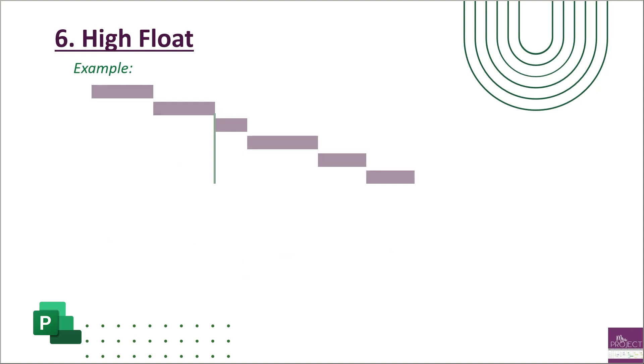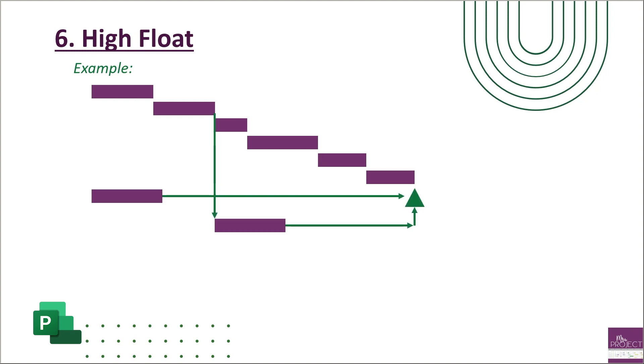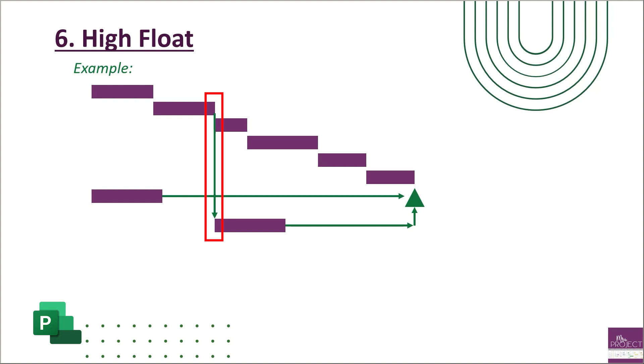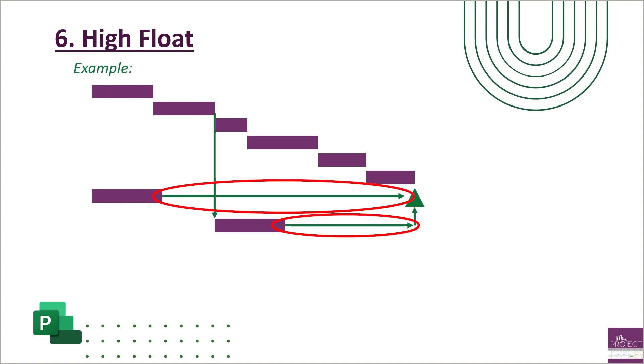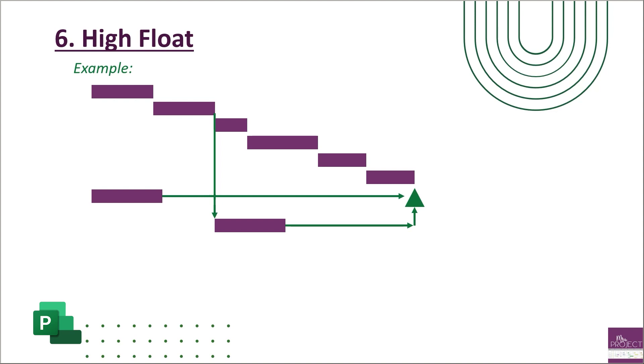Here's an example of high float. You have a waterfall of tasks that gets to your project completion, but then you've got these one and two tasks that are out here. One is starting at the same time as your very first task but it's linked to your project end—that very final milestone to say your project is complete. And then there's another one that's three in and it's linked to your project completion as well. That high float is that green arrow right there, saying you have all those days in between when that task completes until it's needed, essentially. It's saying: are you sure that task is not needed somewhere else? Is it really just you did it the first thing and then it's done?